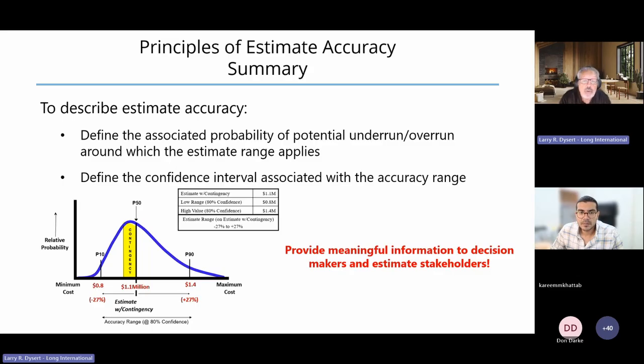There are other distributions that can help define and probably better emulate the skewness of our distributions than a triangular distribution. For a very small project or a less significant project, I might be fine just using triangulars or a bounded triangular. But most of the time in more significant projects, I'm selecting other distributions besides triangular.